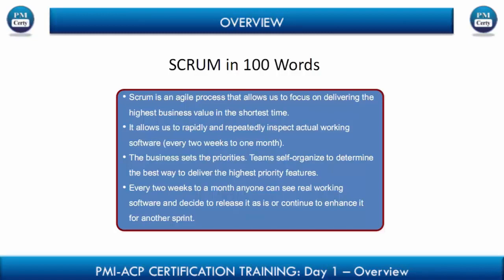And the customer is called every week, or the product owner in the absence of the customer will do what we call a review every week. It's a time set apart for 1 or 2 hours where the team will demonstrate how much they've done as part of their requirement. Each person will show it, and there will be a review and comments around it so that they can move on to the next phase or correct what is wrong.